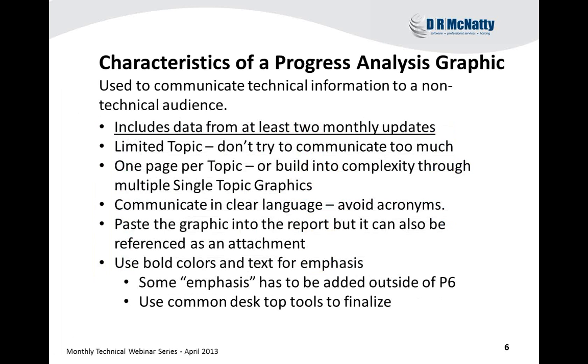So the characteristics of an analysis graphic: basically it's used to communicate technical information to a non-technical audience. It includes information from at least 2 monthly updates. I've done 3. I don't think I would do more than that. You need to keep this simple too. Don't try to communicate too much in one document.